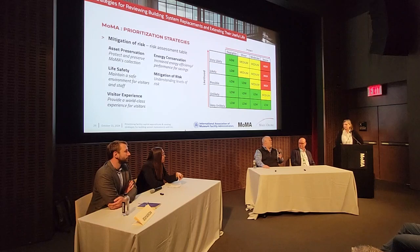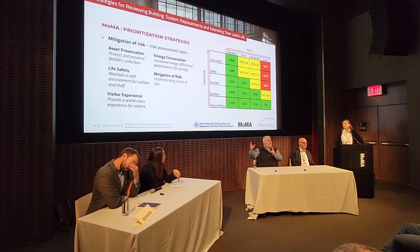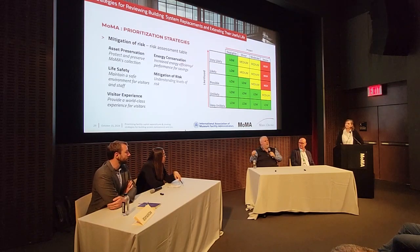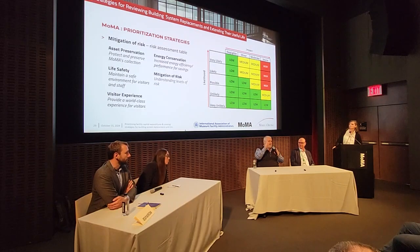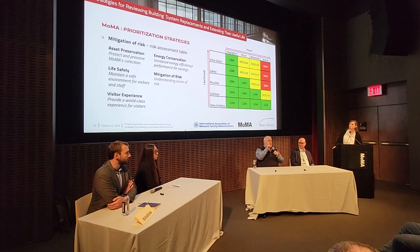Great question. I can talk about commissioning. So commissioning, think of it as a functional performance test of something, a building, a car, whatever. You're going to test this thing under the known conditions as it will be operating. Retro commissioning is looking at a system and saying, this thing's been there 20 years, it's bound to have changed. Let's go back to the original design criteria, which may or may not suit the owner's present requirements, right? So you've got to confirm the owner's present operating requirements and then fine tune that system back to what it needs to be today. Okay, that's the commissioning.